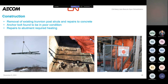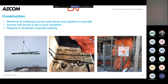We're right on the Minnesota-Canada border in the middle of winter, and we're having them do construction and also concrete spall repairs. It was very cold — weekly site reports came in in Celsius. There were a few weeks where the highs were single digits Celsius, the lows overnight about negative 20 to negative 30 with 10 to 15 mile-per-hour winds. Brutally cold — certainly needed some containment to allow them to do the concrete repairs on the abutment, shown on the right as that containment heat tent.